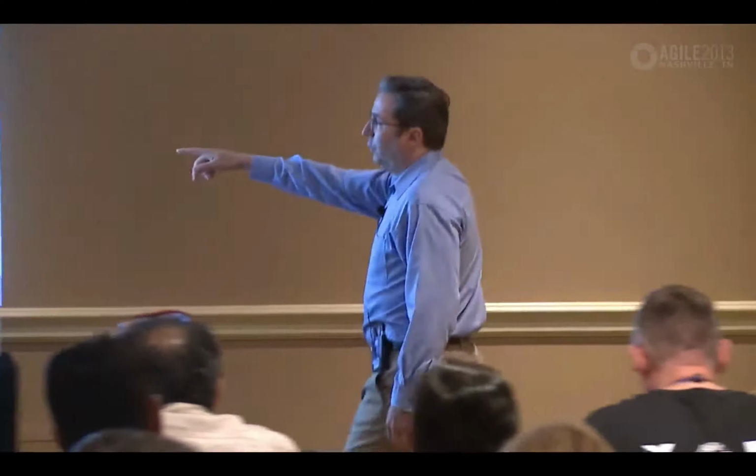The real cost of that is the delay cost, as he was alluding to. Right? When the work doesn't flow, it takes more time to get the product out to the customer. There's a cost associated with the time. So clever us. We drove people to 100% utilization, so we eliminated one form of waste and we made another form of waste go up, the delay cost.